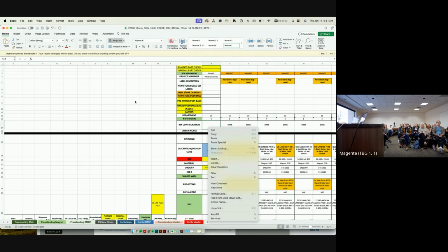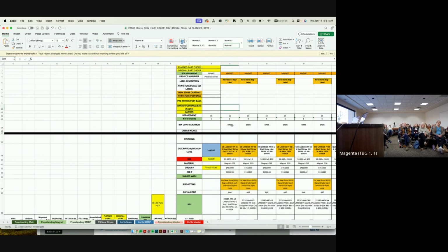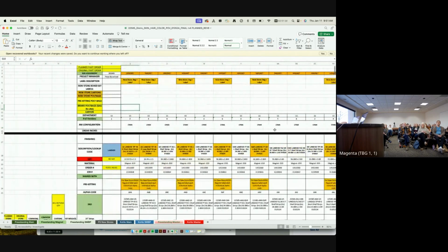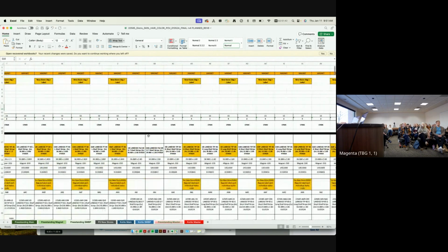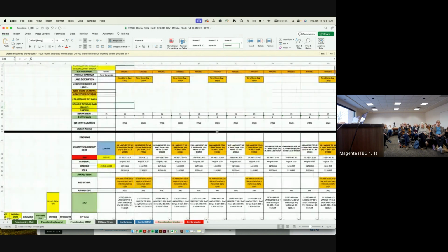But what that did mean was we needed to make some data improvements to our kitting distro by being able to include things like our configurations. So if we have standard CMYK, that's pretty simple. But we also need to call out when things are white plus CMYK, when things are first and second surface, so all of this can be estimated properly. And as we know, going through the prototyping process, ink configurations can change, which would require us to re-estimate some things.